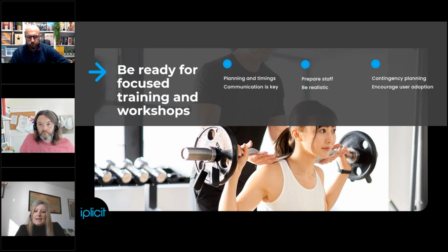As I say, it's really about making sure that you've got the right people in the right sessions. It's about making sure they've got the right time at the end of the sessions to do things that they might be asked to do. We obviously ensure that we have the ability to make changes and to be flexible in that plan. So yes, there's contingency built in, and that might be because there could be some topics that need covering again, or we might need to reconsider a plan we had at the very beginning. A plan is not always right, perfect first time, so we might need to adapt that.